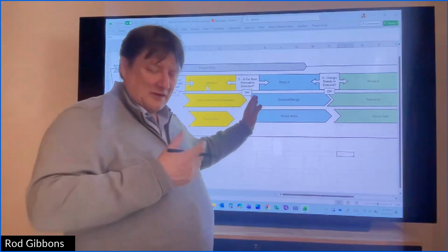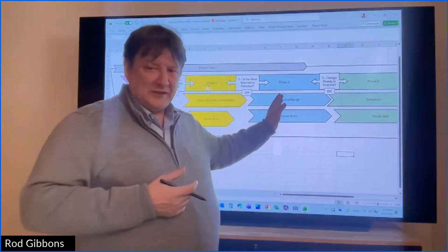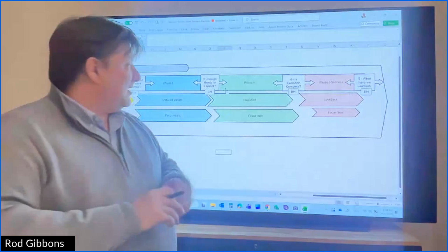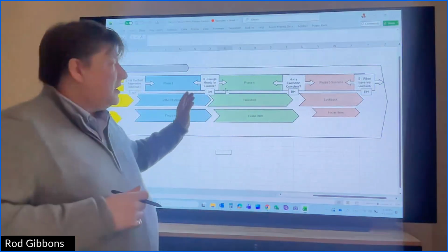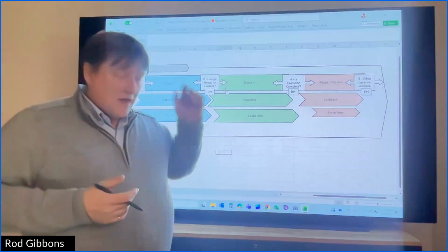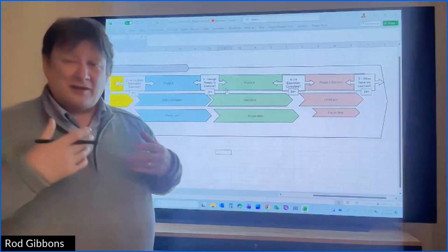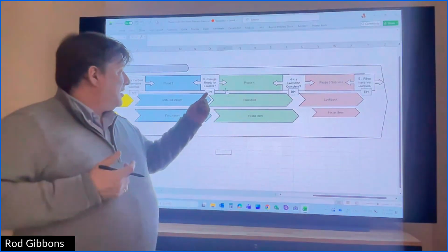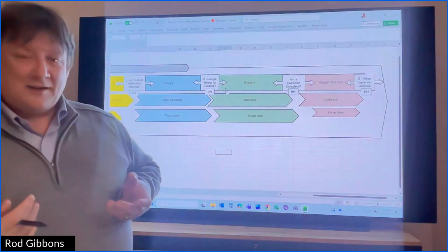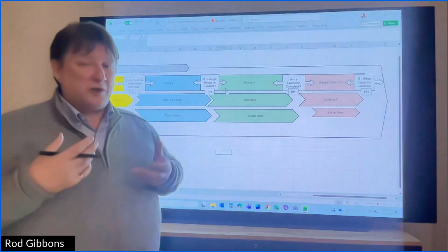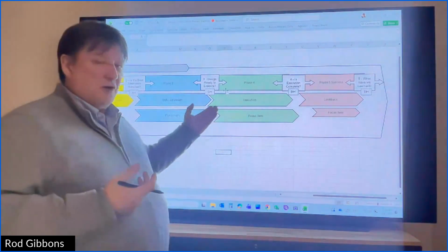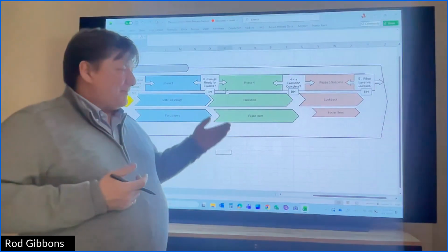Once you've selected an alternative and you're going into detailed design, you're going to do detailed design to the point where you're ready to execute the project. And this is the design ready to execute? So the decision maker determines what's enough engineering been done or enough detailed design been done so that then you can go and execute it.